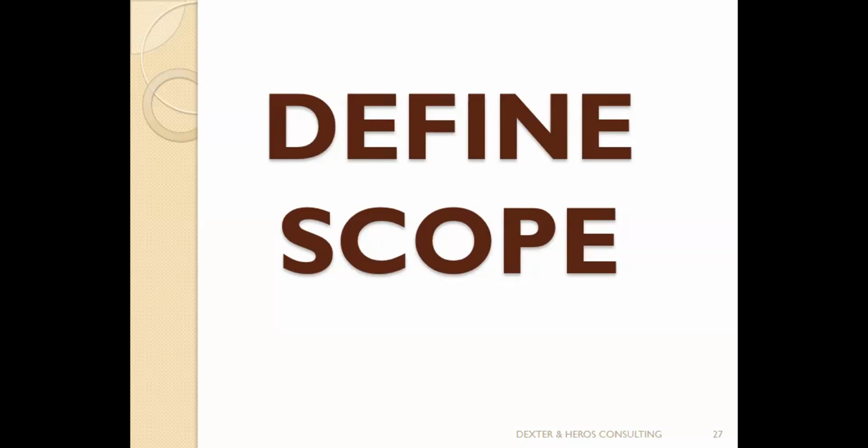So in defining scope, all you need to do is go to each requirement or specification and ask, what will be the work we go do to get this requirement or specification? It may be one work, it may be two, it may be three or more. What works are we going to do to achieve each of them, until you're able to walk through the whole specification? That way, you have defined the scope. Don't bother yourself arranging the works in order of execution. Remember, there's a process I showed you we call sequence activities. We'll do that at that point in time.